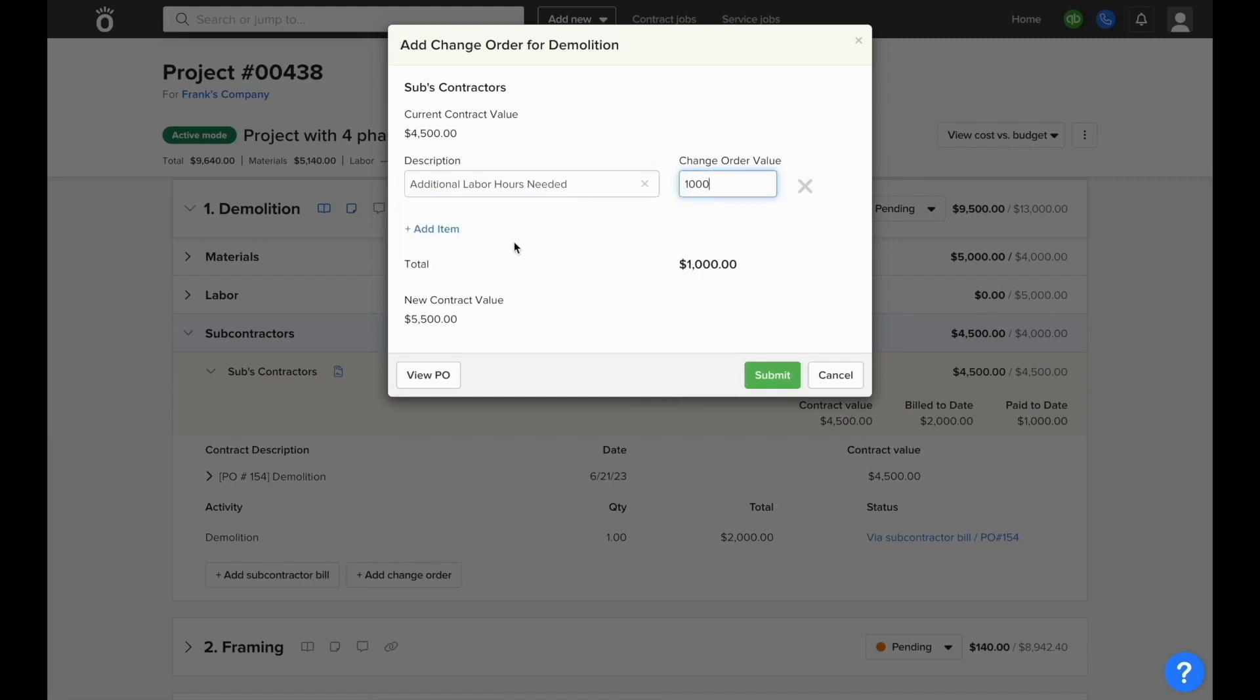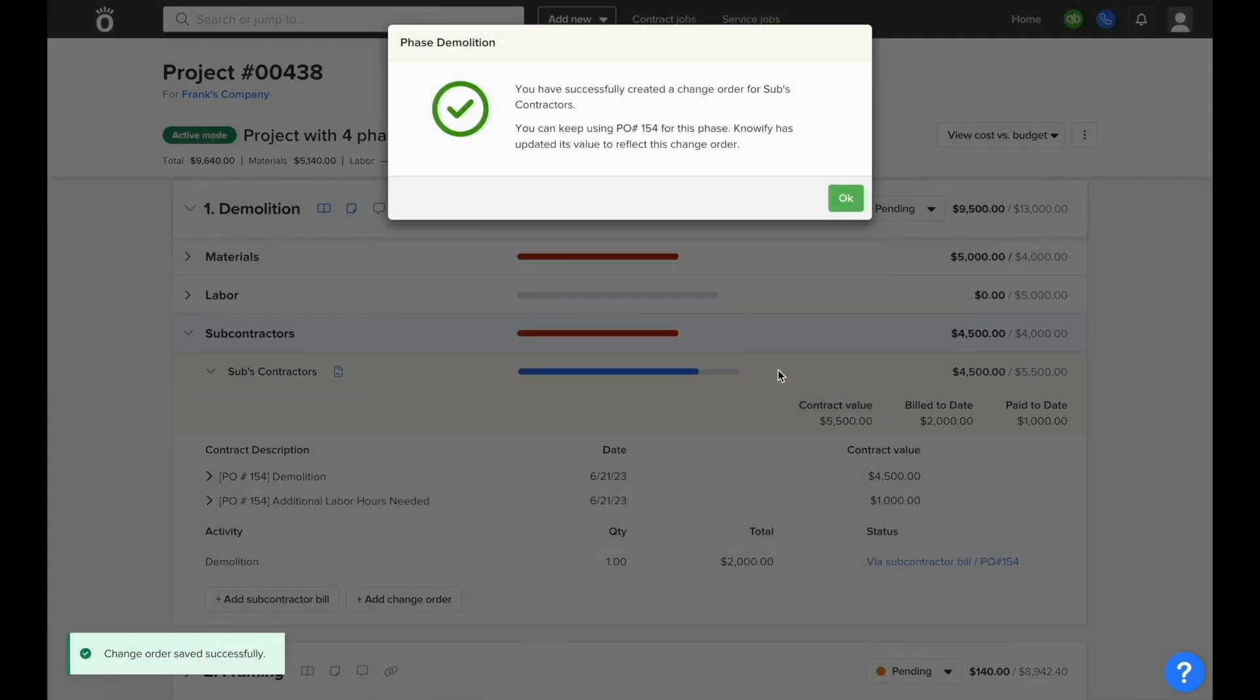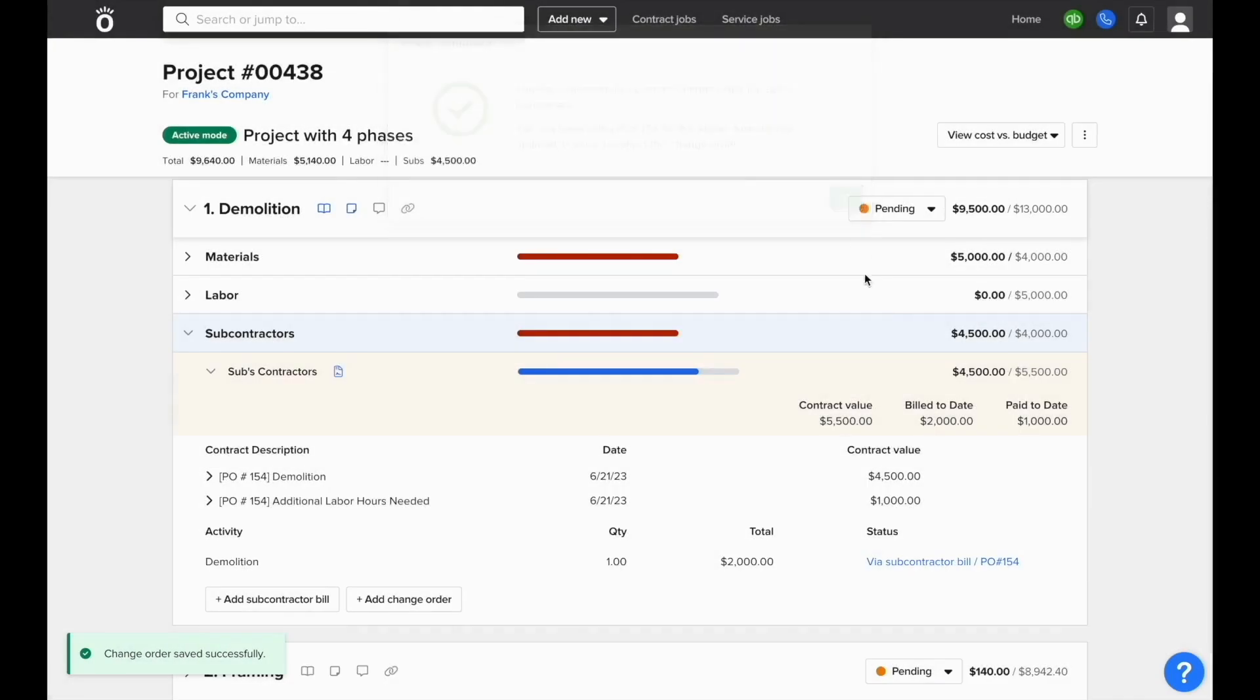You can enter in the value, and when you submit this, it'll adjust the contract value on the PO that's created for this specific contract.